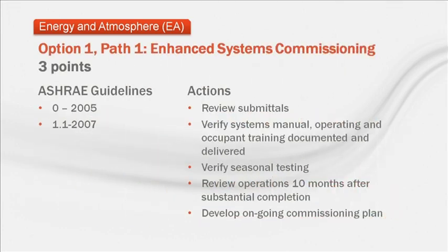Worth 3 points is use of ASHRAE Guidelines 0 and 1.1 to perform the actions on the right side of the screen. Since his or her involvement spans a long time, the commissioning agent can ensure that design intent is met in the actual operation of the building.